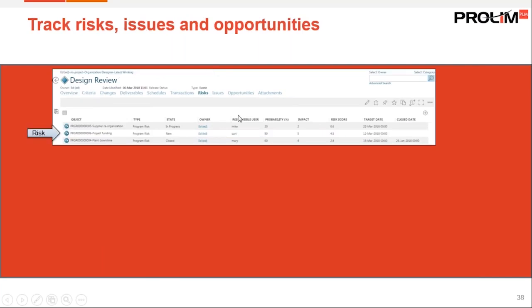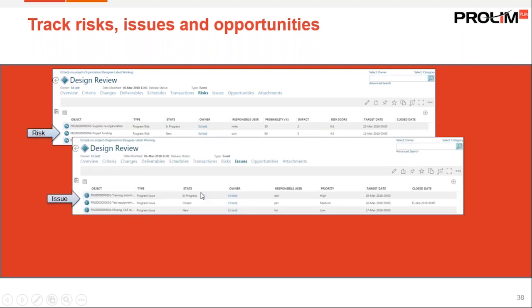And then, as we were discussing, risk is an integral part of any project execution. You will anticipate the risks, you will manage them here, and you will make the contingency plan for each risk as part of each risk item. Whenever this risk arises, these risk items will be initiated and there will be a contingency plan in place which will be followed. Similarly, if some small issues come up during the execution of the program which impact either cost or timeline, then you will have an issue in place, and you would be tracking those issues and the implications of those issues.